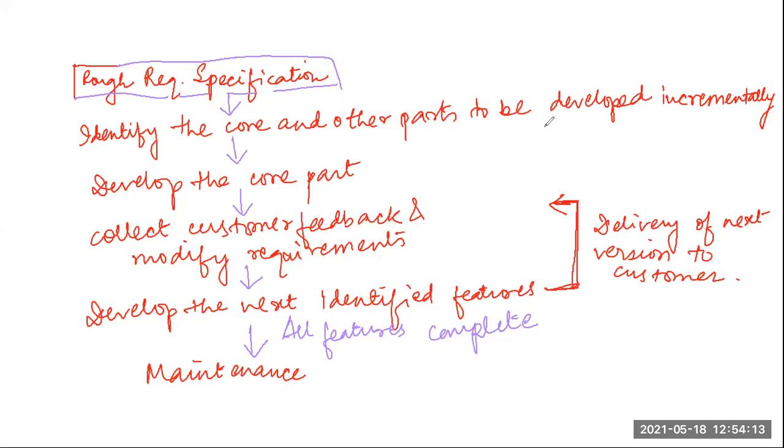And if I make modules A, B, C, D and then give it to the customer and they say a change is needed, I will have to first identify which module is creating the problem, or after incorporation of which module the customer is not satisfied. So obviously a large amount of rework is reduced.